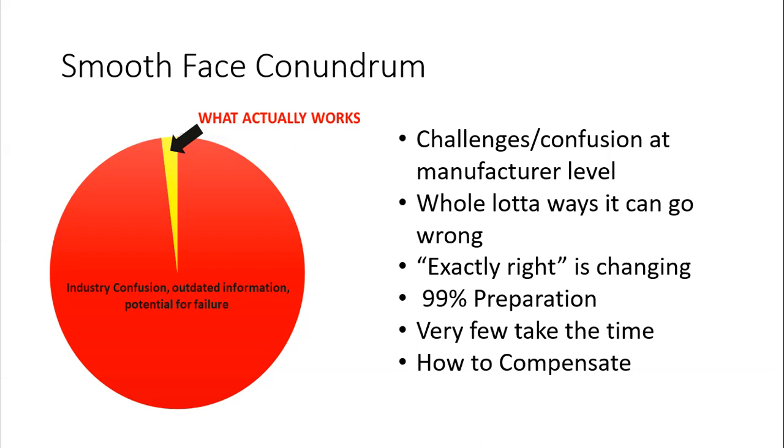You would say, hey, we want to use smooth face, we want to use a 550 VOC stain at the manufacturing level from Olympic, say. And then we want to specify that a painter come back within a year or 2, depending on how the stain is performing, and clean it, sand it, and then apply a penetrating oil-based stain that can be bought in the local marketplace. All right, so that's how you would compensate in the spec.